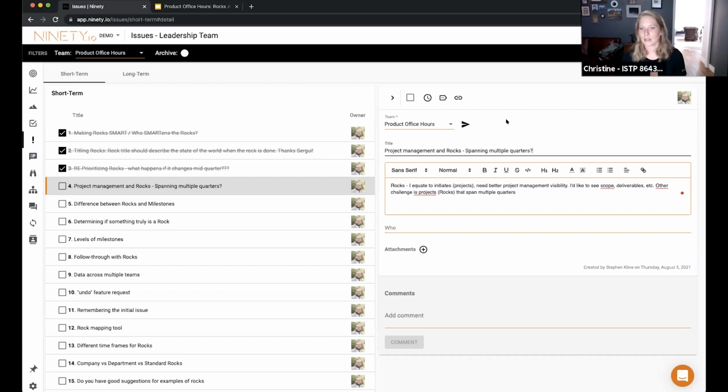Yeah, I think that's absolutely right. And a great thing to consider when you're using 90 with this and thinking, this project is going to be longer than 90 days, use the phase 1, phase 2 approach. We have that internally where we have this bigger goal and we know what we can get done in 90 days. That's just setting ourselves up for success in the next 90-day period.